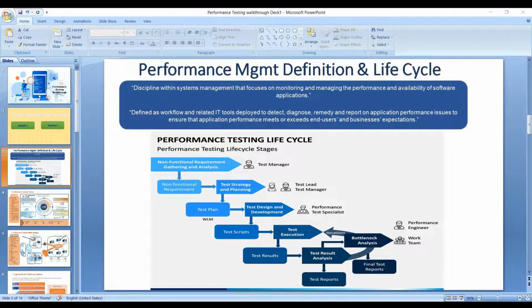Remember that. As I had also explained, for your stage this is the process that I'm going to follow. So at this stage, we'll tell the client, sir, this is the way I'm going to stitch. I'm going to do the performance testing, and these are the steps that I'm going to involve. These are the tools that I'll be using. If I don't have a tool which the client has asked for, or which is required for this project, by this stage I have to procure it, and share that I'll be using this many licenses. If the cost is on the limit, that goes to the billing section. But all those things will be documented at this stage.